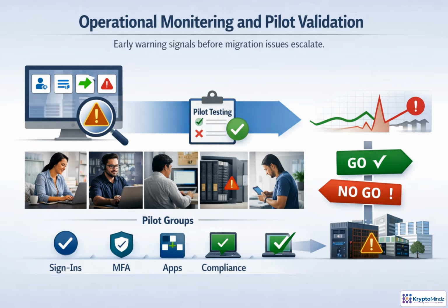Success should be measurable, including sign-in rate, MFA completion, device compliance, app access, ticket volume, and user satisfaction. The go or no-go decision should come from those thresholds, not optimism or pressure. That is how small issues stay small.